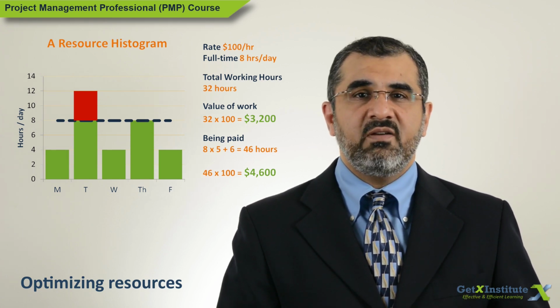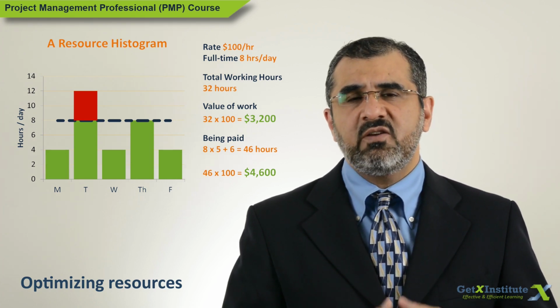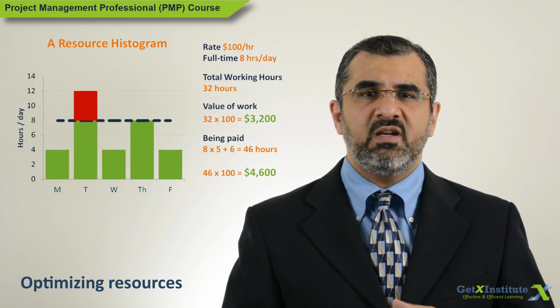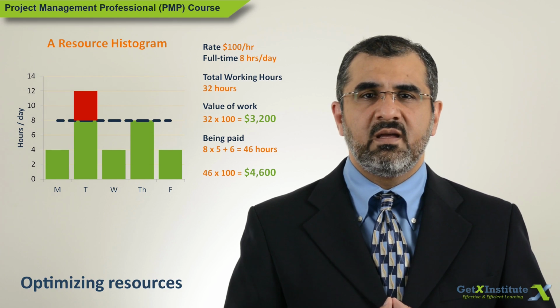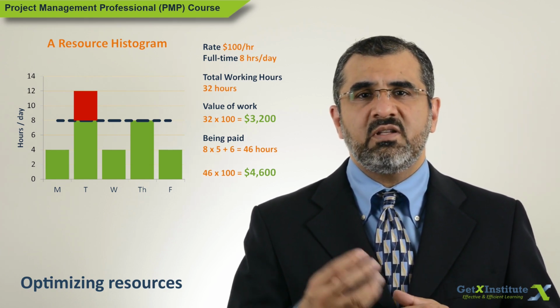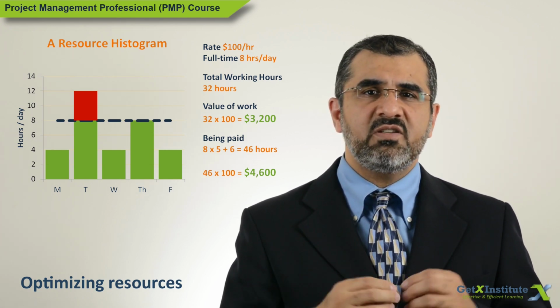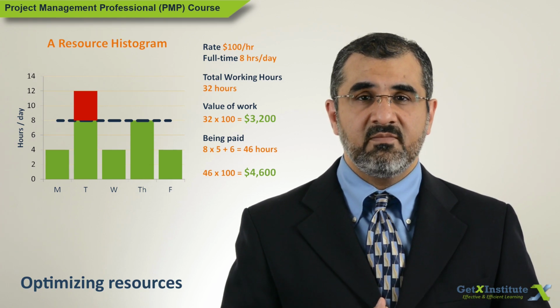Which approach is the right one depends on few things. How much flexibility is there to move the project end date or impacted deliverable date? Is paying no overtime a constraint, or the project end date is the constraint? Is there any constraint or challenge with resource availability?